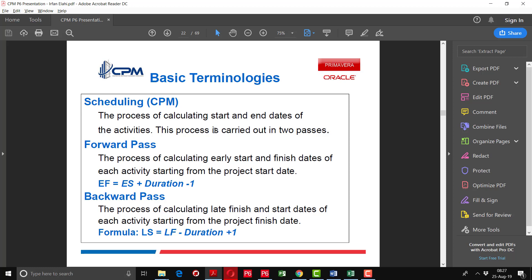When going backward from the finish date to the start date, the process of calculating the late finish and start dates of each activity starting from the project finish date is called backward pass. Primavera calculates the dates in two passes — from start to end, and from end to start — called forward pass and backward pass. The formula for backward pass is: late start equals late finish minus duration plus one.